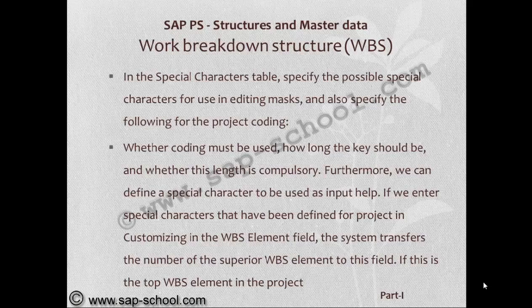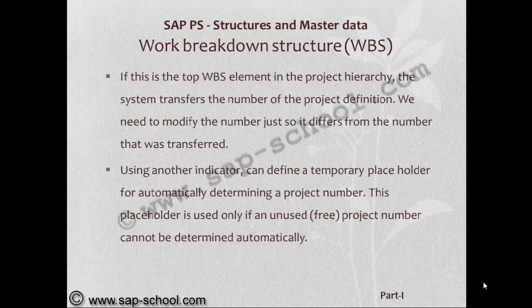If we enter special characters that have been defined for the project in customizing in a WBS element field, the system transfers the number of the superior WBS element to this field. That means the separator special character will also define how many superior WBS elements are available to a particular WBS element.